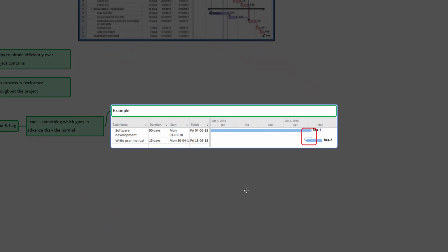Ideally, it's better to start writing the user manual once the development is completed because all the information will be readily available. But in this case, starting a bit early is not going to create any big harm. You will be starting this activity just before the close of the development cycle. The user interface will be mostly ready and the data with input will be ready shortly before completing the user manual.